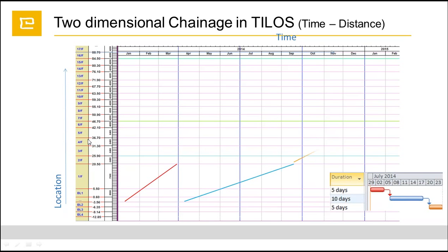So we have the first activity, and we can say it starts in January, from the baseline or base level, and it will take us 2.5 months to complete it until the second floor starts. The same goes for the next activity, which will take us 5.5 months.